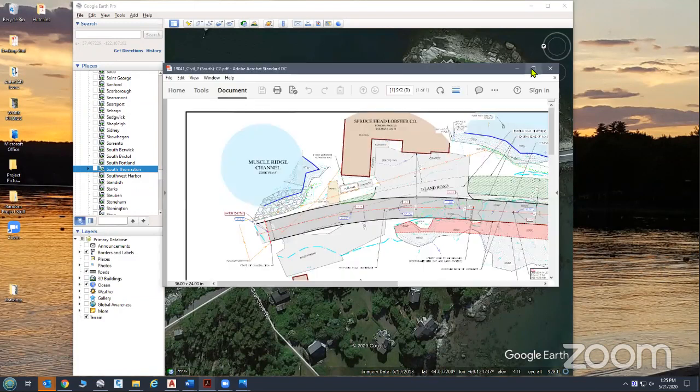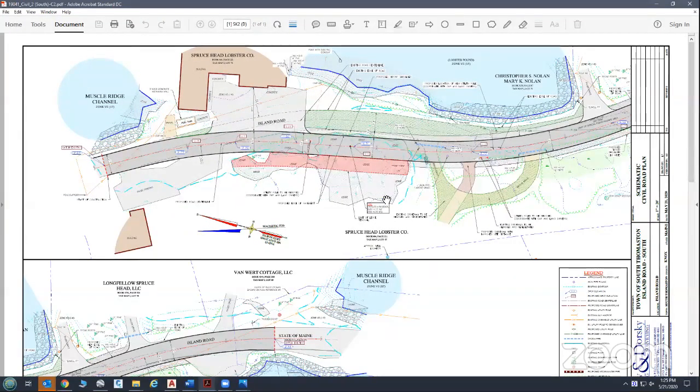So we're a couple hundred feet, or at least 100 plus feet away from that well, and the buildings along there. But how they would handle this is they do a lot of shallower drills, and they make the drill holes closer together. Back a number of years ago, before they figured all this out, and to save money, they would drill like 2 holes in here. They put a big explosive in there, and they blow the whole thing up, and you get left with what you're left with. Now they do it a little more precisely.